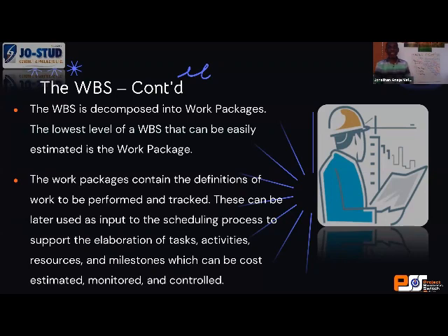Now, I mentioned it earlier that you need to decompose or break down your work to the smallest measurable parts. That smallest measurable part is what we call the work package, the lowest level of the WBS, easily estimated. For example, I took foundation before. It's easy for you to estimate trench digging, footing, foundation block, backfilling, individually than for you to estimate foundation as one whole block. And sometimes it's even easier for you to break down, like maybe backfilling further.